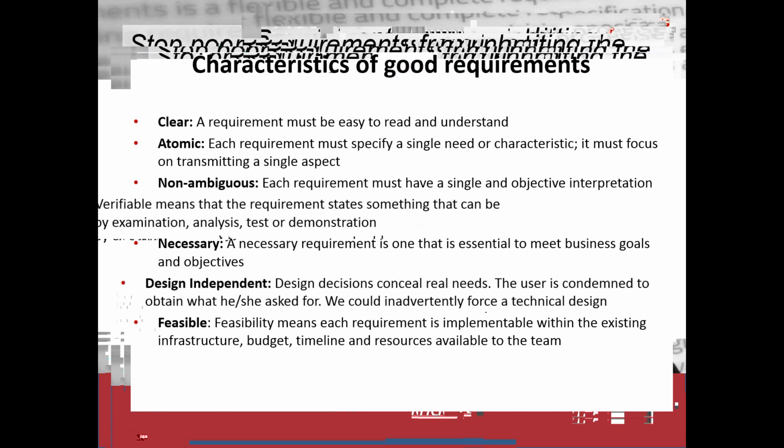Requirements must also be feasible. We have to somehow be sure that we can meet that requirement with the current infrastructure, with the current budget, and with the current time. If not, then it's going to be a failure because we won't be able to finish the specification.